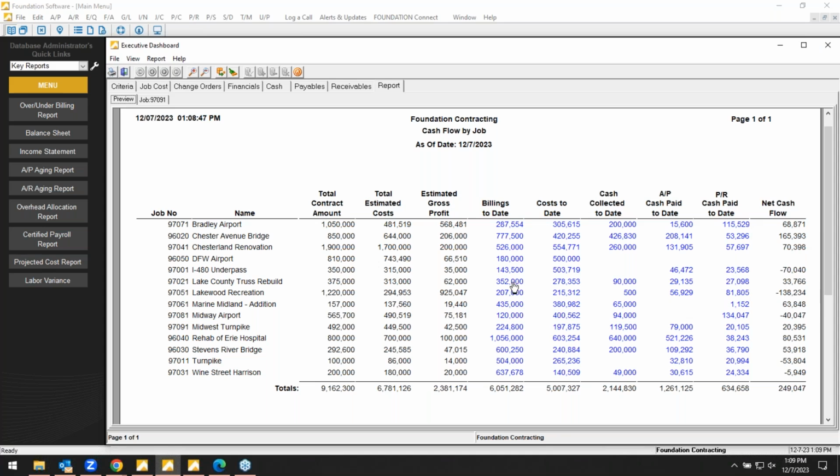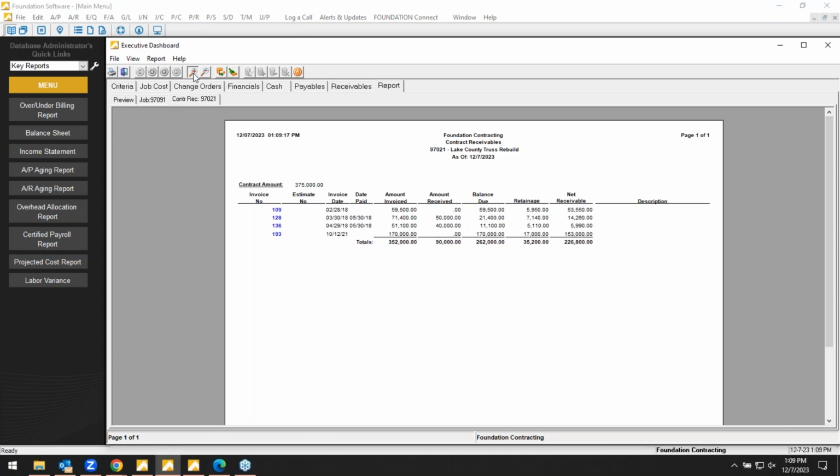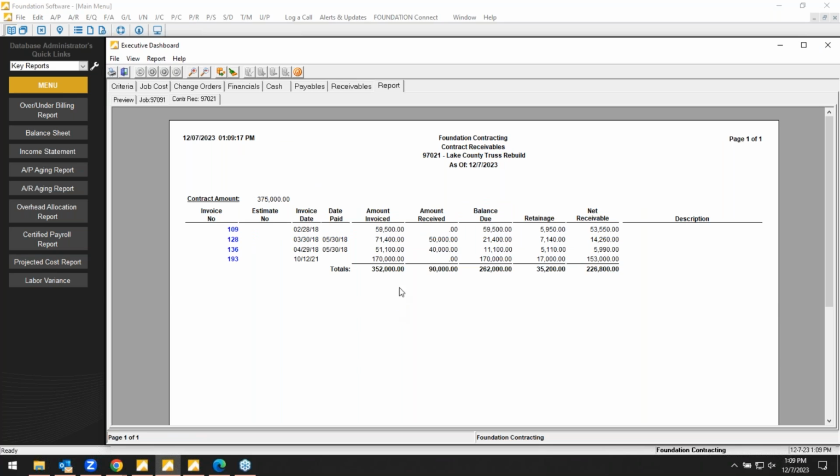And the drill down, okay, I click my 352 in billings. Here's the amount of the billing. What's been paid? Is there a balance? Retainage, another thing that we automate. So the QuickBooks users of the world that are on this call, just know that this is an automated retention. There's no separate entry. There's no goofy looking aging reports. We've got an aging that shows retainage in its own column on that aging report. So again, examples of construction functionality.